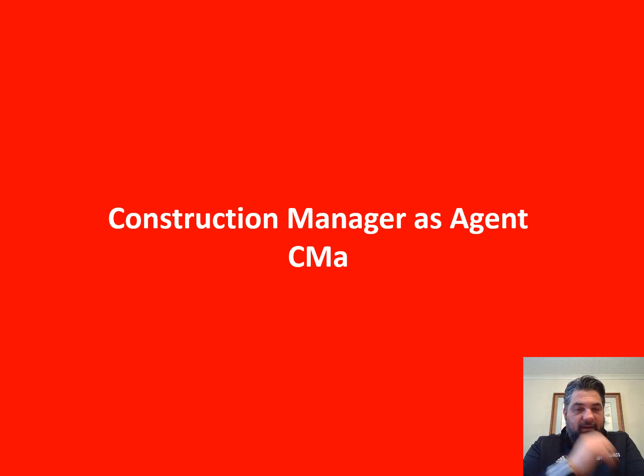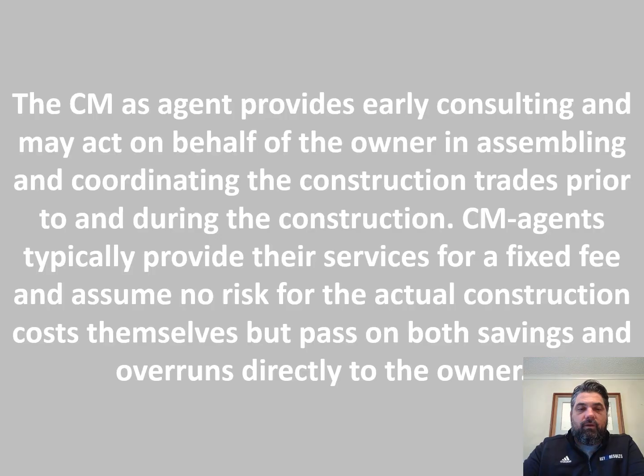The next is construction manager as agent, often abbreviated as CMA. This construction manager as agent provides early consulting and may act on behalf of the owner in assembling and coordinating the construction trades prior to and during construction. The construction manager typically provides their services for a fixed fee and assumes no risk for the actual construction costs themselves, but passes on both savings and overruns directly to the owner.